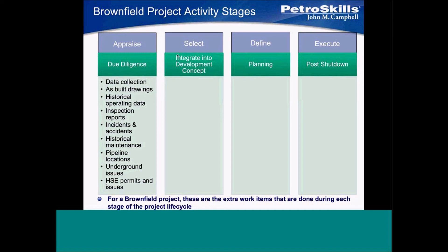So here are some items — and I'm going to show you a case study toward the end of the session. For due diligence, we'll talk about these in detail: data collection, as-built drawings, historical operating data, inspection reports, incidents and accidents. What's the historical maintenance on the unit or vessel? Pipeline locations, underground issues, permits and issues — what kind of permits are you potentially going to have to have when you're working out there? These are all extra items over and above your typical stage gate process.